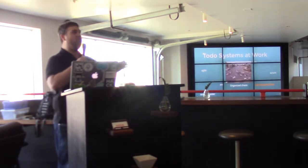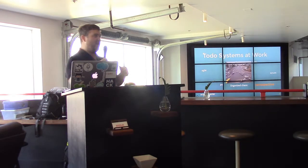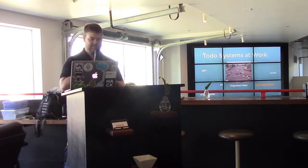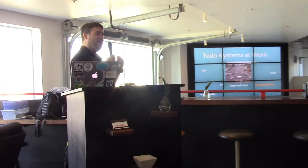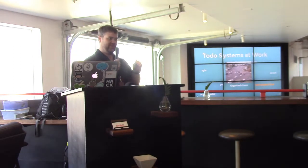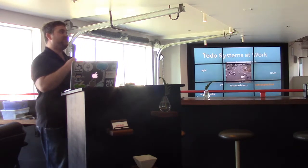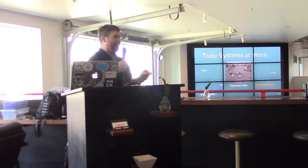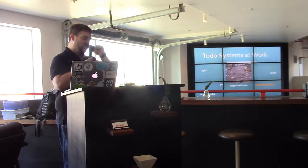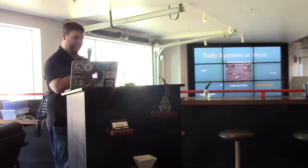And what that means is that we have a whole bunch of positions that are open for us, like for example, the PM, the project manager, whose job is to help get us unblocked, help us be able to move forward. They don't necessarily tell us what to do, they just help us make sure that we can do what we want to do. We have the product owner, who goes through our backlog and makes sure that we have a list of what we want to get done, and also, most importantly, in the order that we want to do it. And of course, we have the Scrum Master, whose job is to make sure our meetings run on time and don't get off track. In fact, at Apto, our Scrum Master has a timer, and the second that the meeting ends, he's like, okay, we're done, meeting's over. If we didn't cover it, we have to schedule another meeting on another day. We're not extending this one.